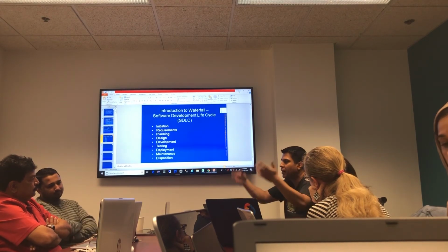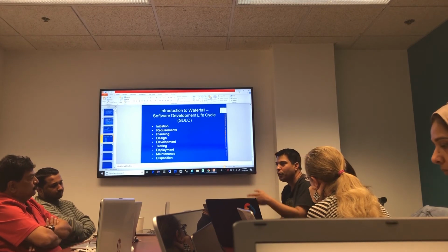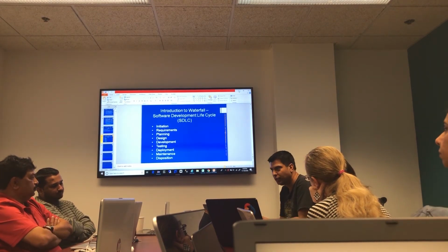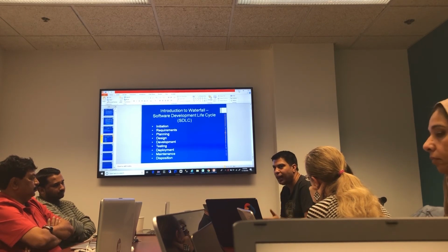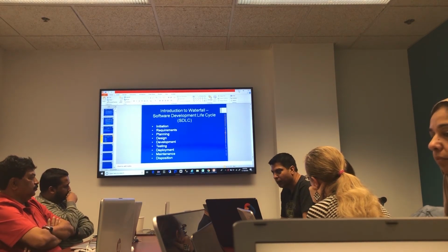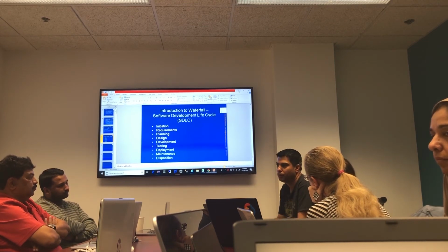Client can keep saying it 100 times, you keep adding more stuff, whatever they want. But you try to explain to them, let us do release 1 first, and if you can wait for release 2, let's wait for that. That is a more efficient way of doing it. The client says, no problem. It will cost you more. We'll keep adding whatever you want.